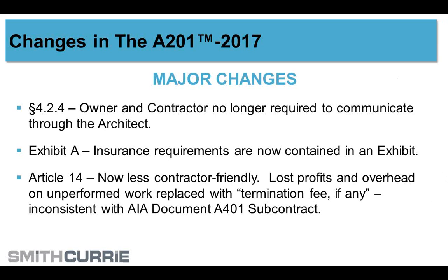Insurance, and you think you're in compliance and you have an insurance program that at least checks all the boxes in terms of what an AIA contract requires, you're wrong. Because there is no AIA requirement anymore. Instead, what you have is all of the insurance provisions have been exported to an exhibit, which is a fill-in-the-blank exhibit, allowing the owners to pick and choose and decide what they want in terms of different levels of coverage, limits of liability, et cetera, or limits of coverage.